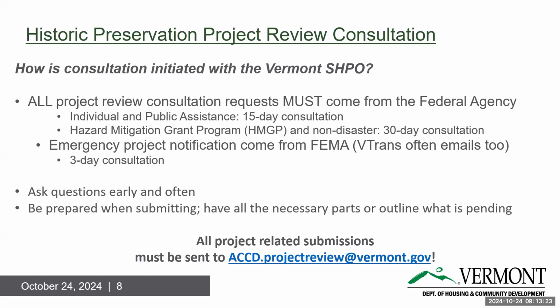And also, when you submit, it is best to have all the necessary parts. And of course, sometimes archaeology or something's happening so you can't get everything you need, but you need to tell us what is missing and when we can anticipate it. It will help with our review so that we don't start floundering around being like, well, I don't have this. Do we have this? Has it come in?